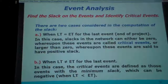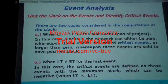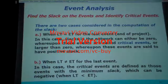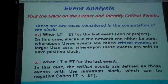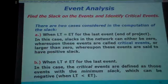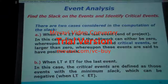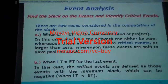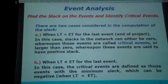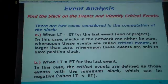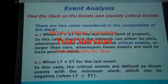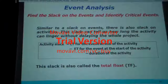How to calculate — two cases in the computation of the slack. When late time equals early time for the last event, end of project: in this case, slacks in the network can either be zero — where they are critical — these events are called critical events. Or other than zero, upon which these events are said to have a positive slack. When late time does not equal early time for the last event, in this case, the critical events are those events with the minimum slack, which can be negative when late time is less than early time. All these can be clear after examples.